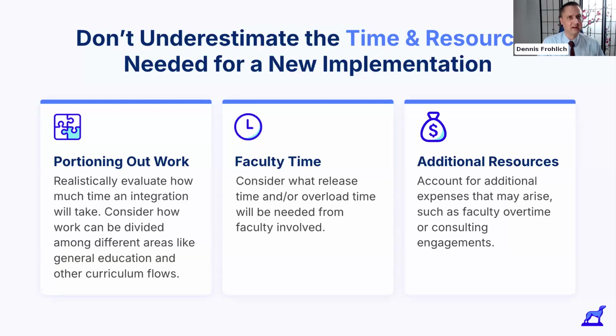Another big thing to consider for any institutions that are thinking of merging like this is that it took a lot of time and resources to make all of this happen. Realistically, evaluating how much time the integration could take, if the work can be divided in different ways, if more time can be given, I think that's always helpful if you have clear goals of what you're doing. If we could redo this, if I was in charge, if we could have had 2 years, for example, 1 year just to do the general education component, and then the next year to do the rest of the curriculum, that would have perhaps solved a lot of headache and maybe gotten some more faculty buy-in, etc.